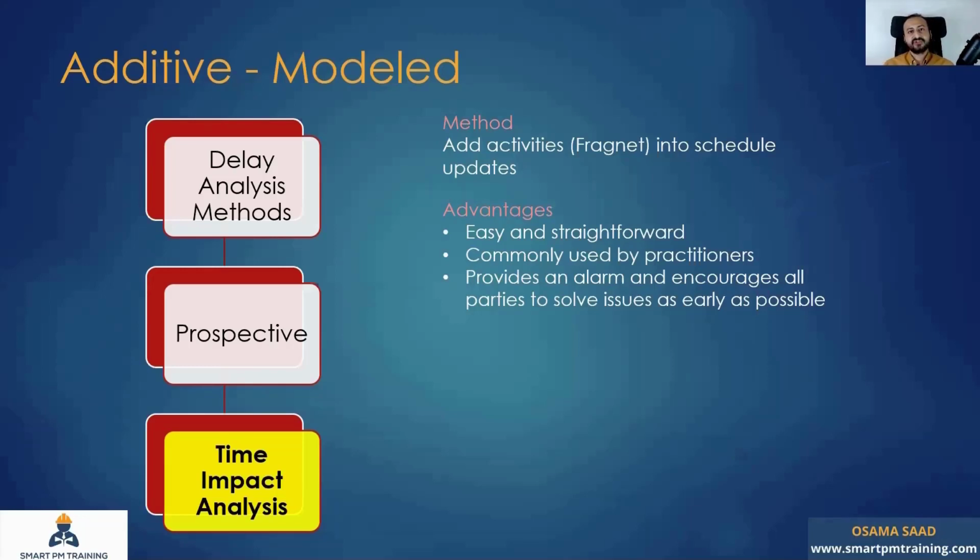And maybe the employer will interfere. He will tell you, it's in my benefit, I will give you money so you can ship the material by air freight, and it will save me a lot of time. It depends on the case you are dealing with, the end user, and the definition or boundaries of project success and achieving its objectives. So sometimes it's actually better for the employer to give the contractor money to expedite the shipping and maybe have it delivered in 2 weeks instead of 90 days.